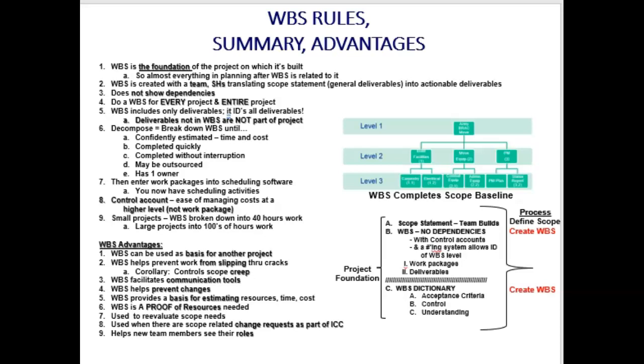And from there, once I have my scope statement previously discussed, the work breakdown structure here discussed, and the WBS dictionary, once I have all three, those three items form what project management calls the scope baseline. The scope baseline is the scope statement, the work breakdown structure, the hierarchical structure, and the WBS dictionary, okay?